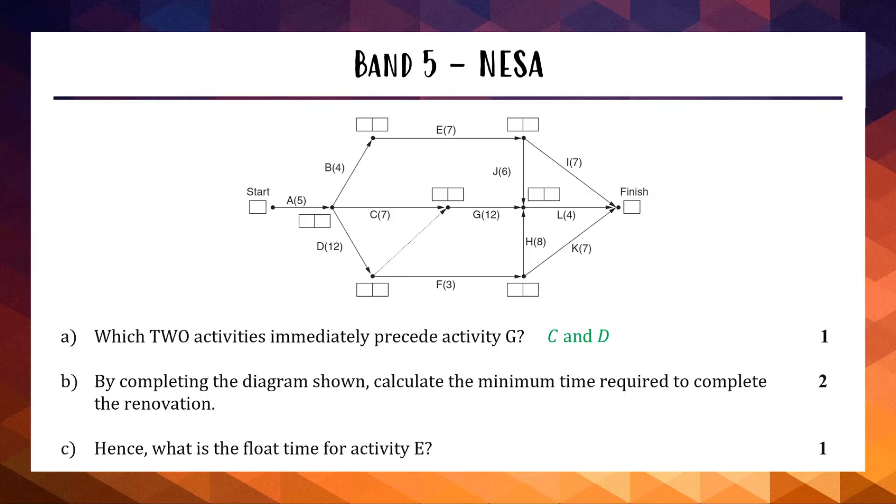Question B: By completing the diagram shown, calculate the minimum time required to complete the renovation. We're trying to find the earliest finish time for this job and we're going to do what's called forward scanning. We start off by writing a zero at our start and now we're essentially trying to find the longest time to get to any of the vertices. The critical path is the longest path through your network diagram.